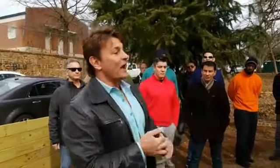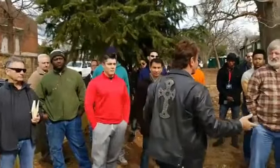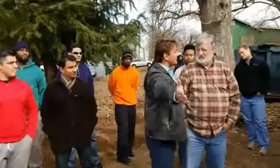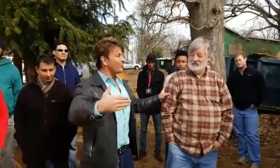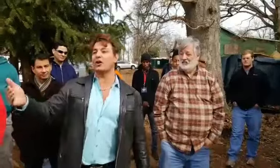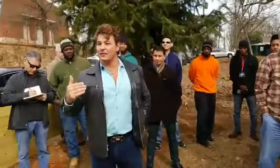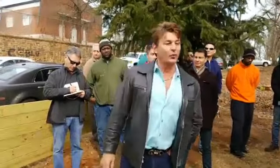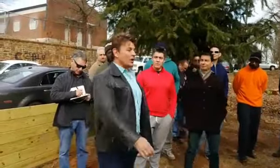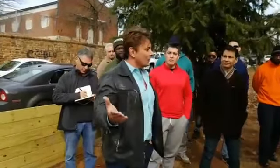But when I pay people on the job sites on Friday, I always go, hey, James, did you pay all your guys here? Did you pay them? Right in front of them. I make them accountable, because I've been through that dog and pony show before. Nothing makes me more angry than when somebody doesn't pay somebody. I have a real hard time with that. Or they call a bunch of people in to do stuff, and they promise them a price.